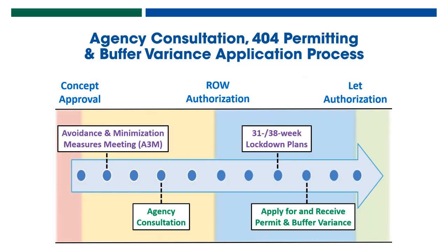This is kind of an uncomfortable situation for designers, and for environmental SMEs as well. Even before FFPR, when there's another opportunity to talk through these things, it's supposed to be pencils down within those ESAs. This is just a vestige of the negotiations undertaken years ago to offer a stopping time when ecologists could confidently apply for a permit authorization without the expectation that a designer will come back and say, oh, we changed this.